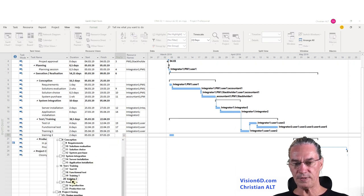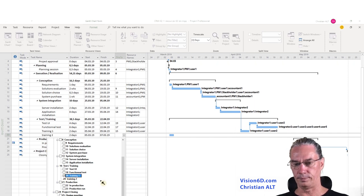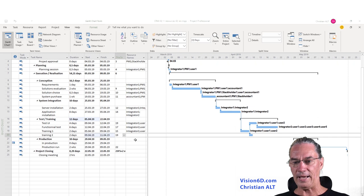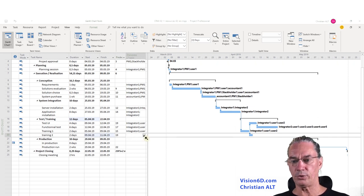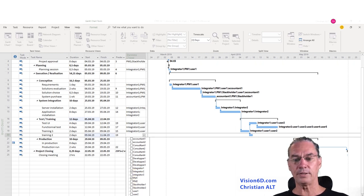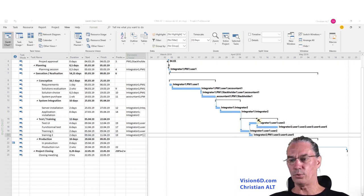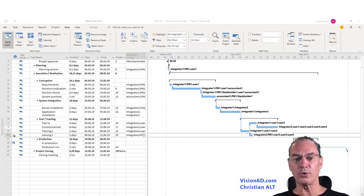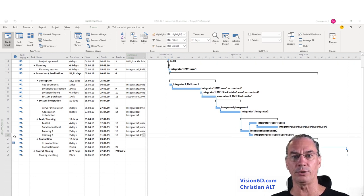Training 2 will follow training 1. The resources assigned to training 2 are integrator 2, the project manager, and users 3, 4, and 5. We see that the change has been made, and all those figures showing over-allocation have disappeared — meaning we've solved the problem.